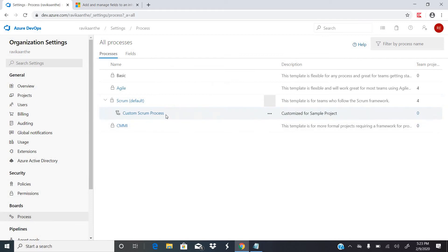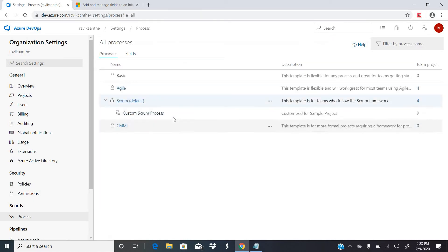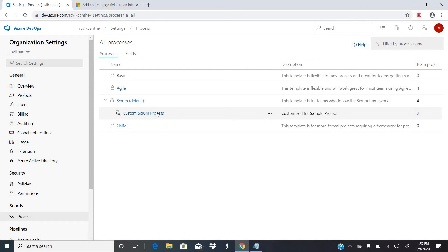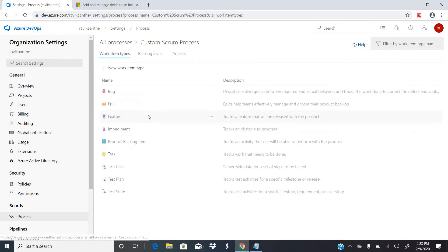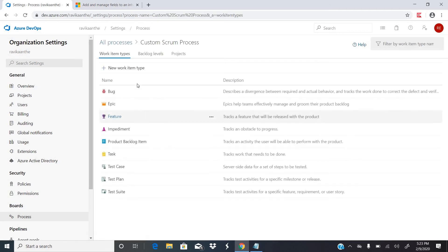Click 'Create Process'. As soon as you create a process, it is going to copy the entire system-defined process layouts and form a new inherited process. That means it copies the entire system-defined process as-is. Now if you want to customize it, click on the inherited process.